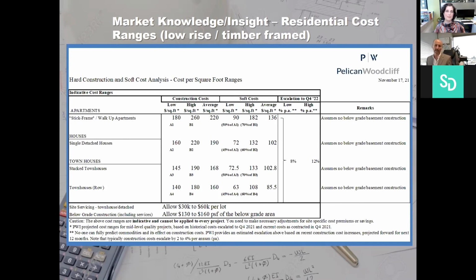Prefabricated could definitely make sense, and where it actually makes more sense from a cost perspective is the savings in time. So generally, you would actually have things up quicker, and you get out of there quicker, and you get your equity back quicker, and the loan gets paid back quicker. So I think those are the main reasons why people would go prefabricated.